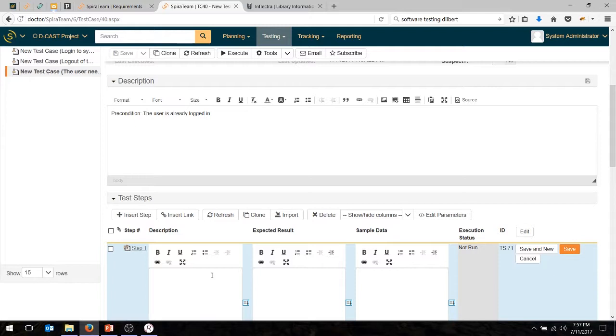If it's a user that doesn't know the application, if it's a formal UAT that you have to do by law, that the end users, for example, in a hospital, you've got some nurses who have to use this system and prove they can use it, then you might have to write test steps that are almost like the instruction manual. So that's something to think about, who the end user is going to be.